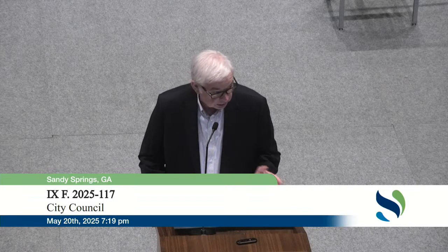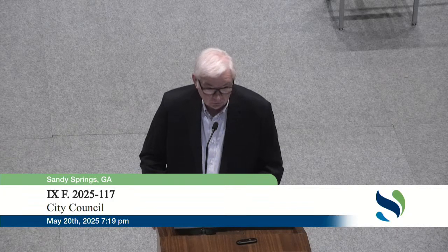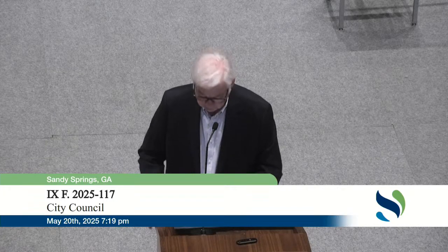The proposed total fee for this change order is $242,148. Of this total, $202,000 will be funded by TS-191, and as I indicated, we're also being able to take advantage through good pricing of some $39,000 worth of work in TS-192, which, as a separate project account, would fund that work. Sufficient funds are available in both projects to fund this work. With that, staff recommends acceptance of this change order. You've heard the report of the Public Works Director. What's the desire of council?